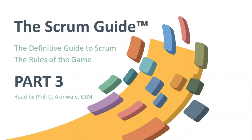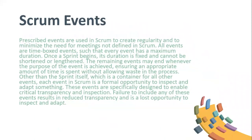Part three: Scrum events. Prescribed events are used in Scrum to create regularity and to minimize the need for meetings not defined in Scrum. All events are time-boxed so that every event has a maximum duration. Once a sprint begins, its duration is fixed and cannot be shortened or lengthened. The remaining events may end whenever the purpose of the event is achieved, ensuring an appropriate amount of time is spent without allowing waste in the process.